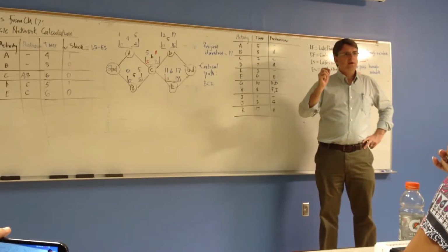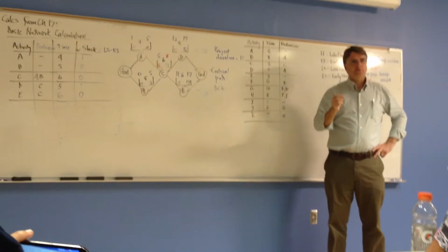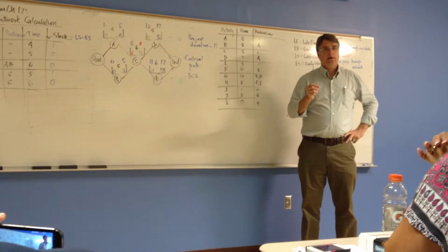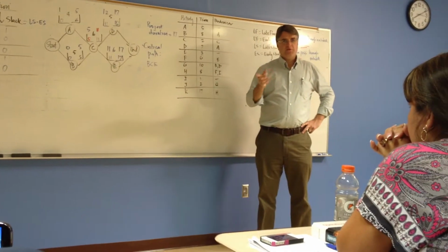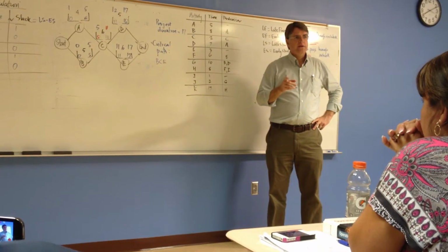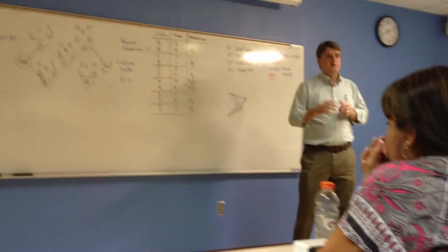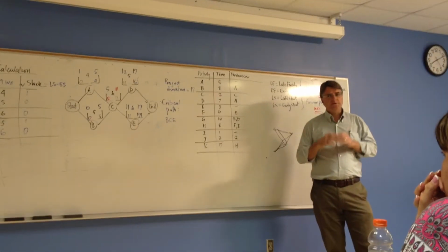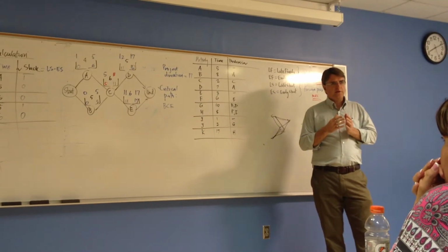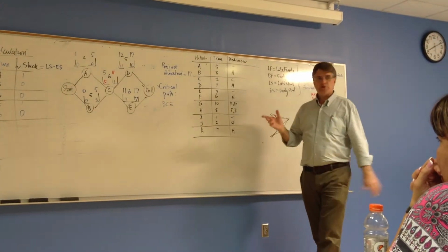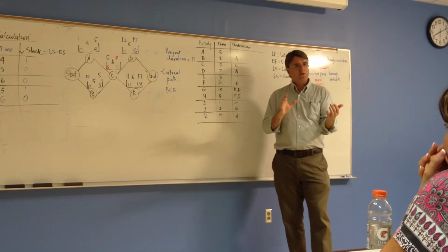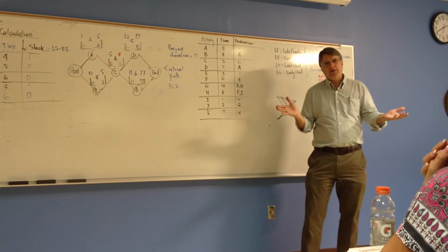Where do you think you would expedite activities? Which activities? The critical path. Exactly right. Now, the interesting thing about the crashing process, we're just having a little two-cent conversation about this. Of course, they're going to be critical path activities, because if you don't crash on the critical path, you're not shortening your project. So why bother?